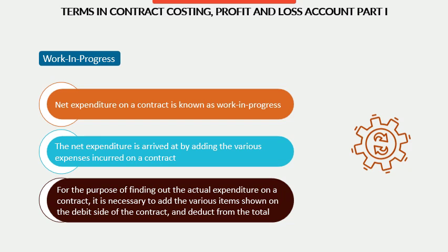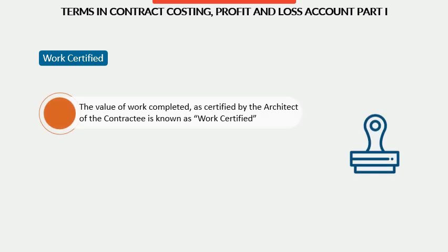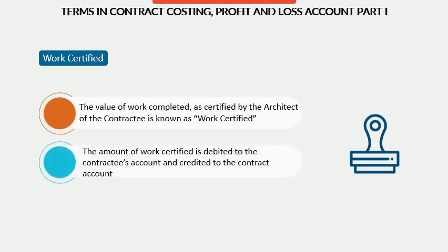Moving on to the next slide. Do you know what is work certified? The value of work completed as certified by the architect of the contractee is known as work certified. The amount of work certified is debited to the contractee's account and credited to the contract account.